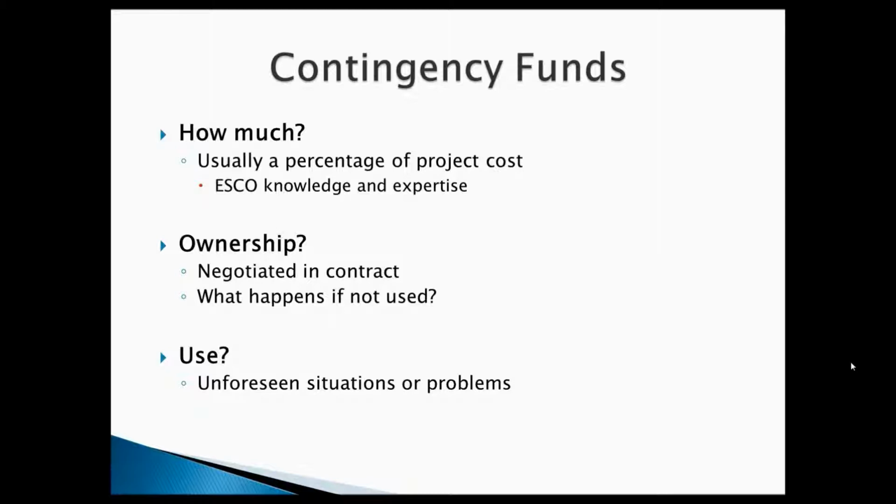There are a couple of instances that I have seen where, through no fault of the customer or the ESCO, something came up that needed to be paid for, and those contingency funds were used for that. I'm just going to give you a quick example. We were replacing large chillers, and they took the one out, and the pad was broke, cracked up, couldn't be used to replace the chiller.